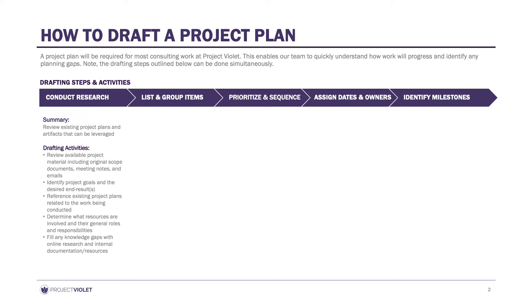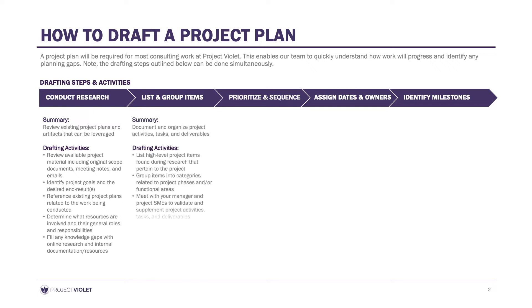Next is list and group activities. Based on your research, start listing the high-level tasks, activities, and deliverables. In this step, don't worry about sequencing or priorities — simply get all your thoughts and ideas into one location. Once you have a few items, you can start grouping these into high-level categories or sections of the project plan.